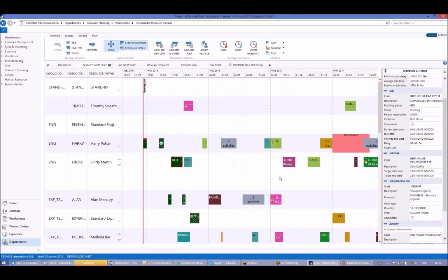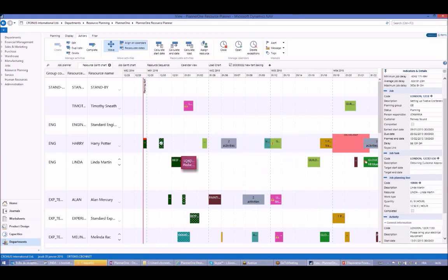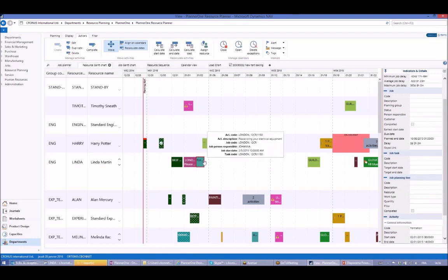You would just have to say, like, this one will be then, and I have 2 things at the same time. You see here it's infinite capacity in the resource planner. You can have 2 things planned at the same time. This is the same as Outlook. When you have 2 of them, you could say, okay, this one will come after. And this would be a way, okay, I stop this one, which was supposed to be there. I do the other one before, and then I put this one after. So you can just do whatever you need with the order of your operations, of your activities, sorry.